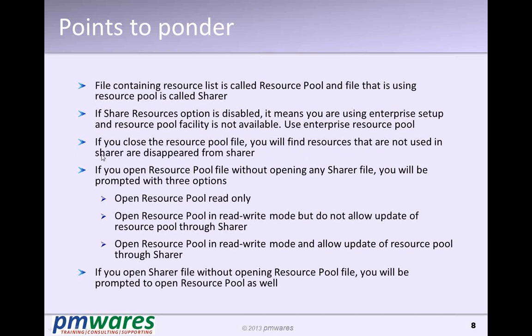Now, the project file which is using the resources is called sharer. We need to keep the resource pool always open as long as we are working in the sharer. If you close the resource pool, the resources from the sharer will go away.